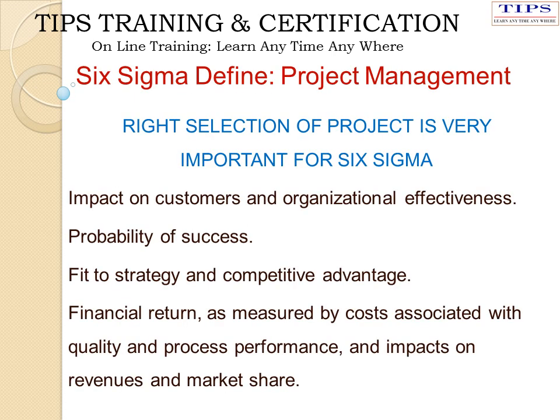Right selection of project is very important for Six Sigma, because it will decide whether the project will be successful or not. We have to consider certain factors such as impact on customers and organizational effectiveness, the probability of success of the project, fitting the project to the strategy and competitive advantage, and the financial returns in terms of cost which will be achieved after carrying out the Six Sigma project.